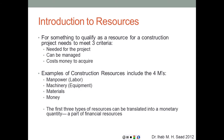For something to qualify as a resource for a construction project it must meet three criteria: first, it has to be needed for the project; second, it can be managed — sunshine, for example, cannot be managed so it's not a resource; third, it has to cost money to acquire. Air we breathe is free so it's not a resource, but compressed air produced by a compressor can be managed and costs money, so it qualifies.